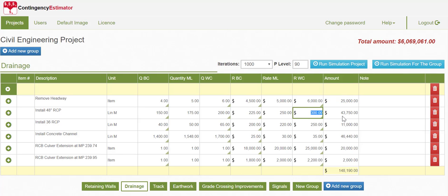The beauty about this is that it can all be operated by the project manager. He or she is the one owning the estimate, a single source of truth, which is very important, and at any time can update the data as new information comes in. When it comes to project forecasting, I can look at last month's result and today's result, and the difference between the two is hopefully the reduction in contingency that's required. I'm sure you'll agree that's a very simple process.